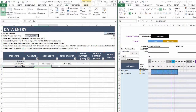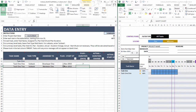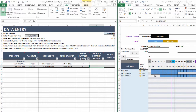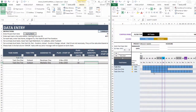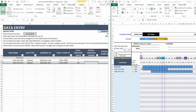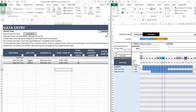I'll create another subtask, Task 1.2, assigned to Marketer 1, starting November 5th for 10 days. Task 1.2 runs from November 5th to November 19th, factoring in four weekend days (7th, 8th, 14th, 15th) and the holiday on November 17th. The summary-level task automatically looks at all subtasks and picks the minimum start date and maximum end date — so Task 1 spans November 2nd through November 19th, calculated automatically.